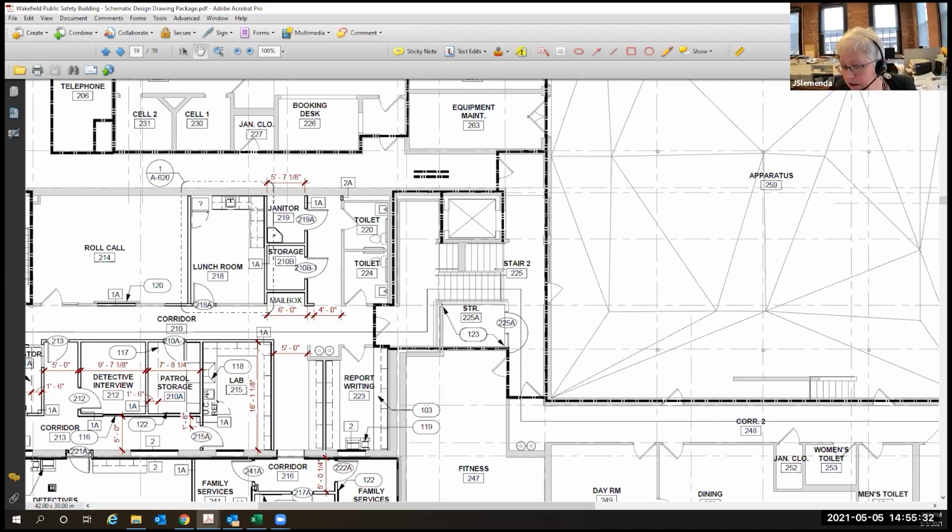This one requires steel. It's a floor we're filling in, so you have to figure out how to attach this floor structurally. And it'll have to be fire rated because it's within the stair, touching the stair. It does have complications, I think that's why we left that out of the study. So if we leave it on the list, it would be a maybe. Let's go back a second. It's about 7 by 10, 70 square feet total.